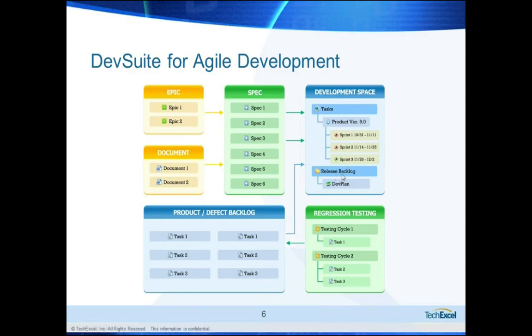As you perform the development, you can also analyze for each sprint which requirements have been finished. Therefore, based on the linkage of testing case templates, you can calculate the total testing you need to perform for the requirements that have just been finished based on your development sprints. Therefore, you can do testing just for a development sprint, or you can do regression testing for multiple sprints and even multiple releases.